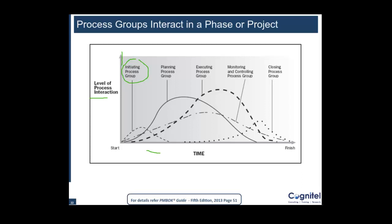Once you move ahead, you can see that planning interaction increases to the maximum, and at the same time monitoring and controlling is also rising slowly and steadily. Once you are in the middle of planning, you would have also started some execution, so execution is also increasing. Now once you move on further, execution becomes the most interactive process group and planning starts coming down, while monitoring and controlling remains throughout — this line goes till the very end of the project.